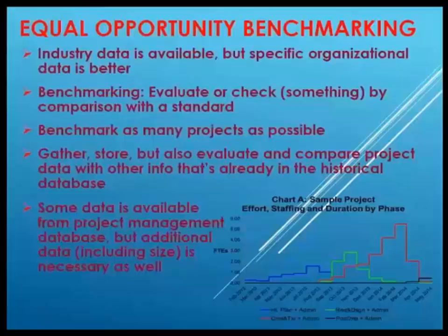Some data is available from a project management database, such as MS Project, but that doesn't tell the whole story. The biggest part of the story is size, and that's not in that project management database. You've got to get that in some other way. My organization does it by interviewing the project team. We've got to somehow figure out that size, and there are multiple ways of doing that. We'll get into that in just a moment.